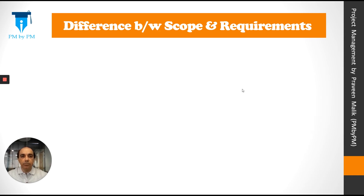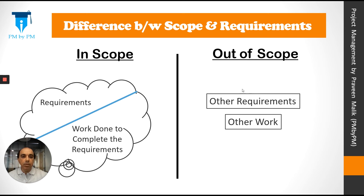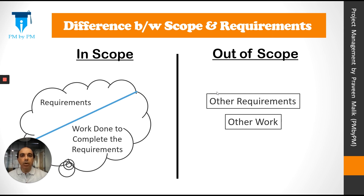What's the difference between scope and requirements? Think of a cloud that represents what is in scope — that is, part of the project scope. There will be requirements which are part of the project scope, and the work done to complete those requirements is also part of the project scope. Other requirements that were not considered are out of the project scope, as is the work that might happen because of them. So scope defines the boundary — within the boundary we are going to work, and outside the boundary we will not. All the requirements and all the work done within the boundary is part of project scope.